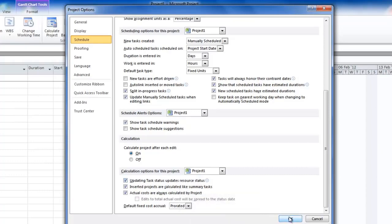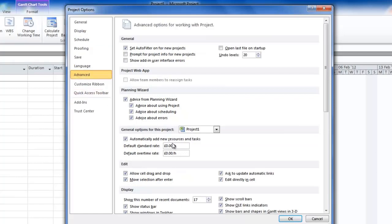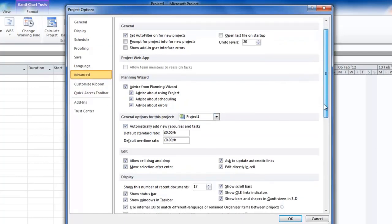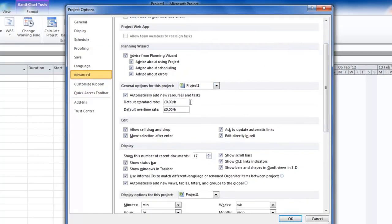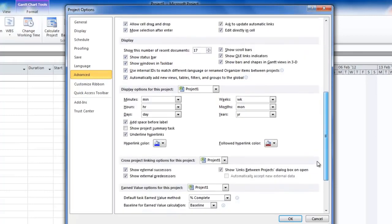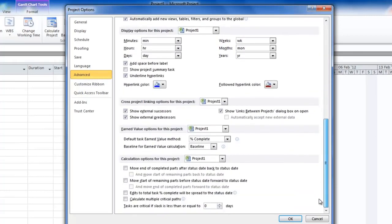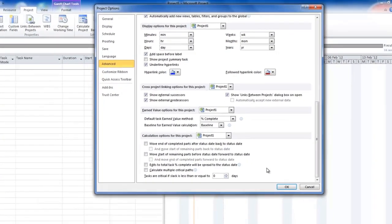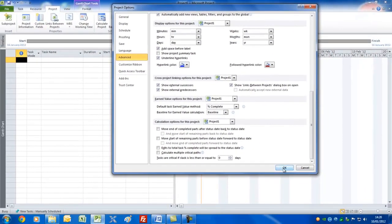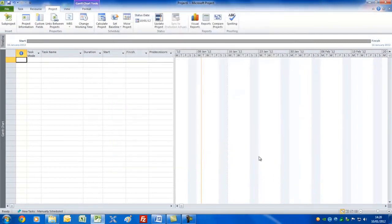I like to check 'updating task status updates resource status' — that way when you put a task at 20% complete it'll adjust the work ratio to the same amount. There is an Advanced tab; I suggest you leave most of this as it is. You could set a default rate for your resources in terms of how much they're costing you per hour. Let's press OK.